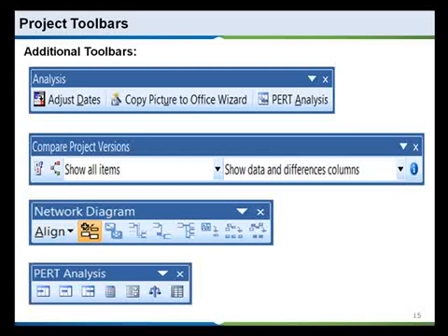And of course, your last one is your PERT analysis, basically calculation, what they usually call your 3-point estimate, how to input information and to calculate your optimistic plus 4 times your most likely plus your pessimistic, all divide by 6 as your PERT analysis or your PERT estimates.